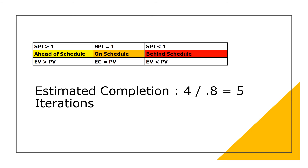The analysis of the SPI is comparable to the CPI analysis. An estimated completion can be calculated by dividing the planned iterations by the SPI. In our example, we planned to finish the work in 4 iterations and now expect to need 4 divided by 0.8, which equals 5 iterations.